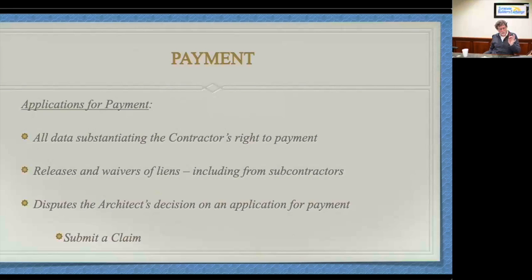Watch as well, just as a quick aside, for similar language when you sign a change order. Very often the change order will say that this includes all impacts and delays related to the change. So you sign a bunch of those as you're going through a project. Don't expect to make a delay claim later, because by signing a change order you will have indicated that you've just gotten paid for that because you included it in your change order. Watch this stuff. Somebody's always out there waiting to keep your money. All you've got to do is give them a chance.